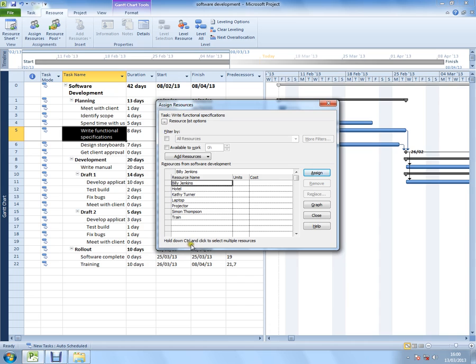Hold down control and click to select multiple resources. That only applies to work resources, so I can ignore train and hotel here, which are cost resources, expenses for tasks. But it's a very key message.